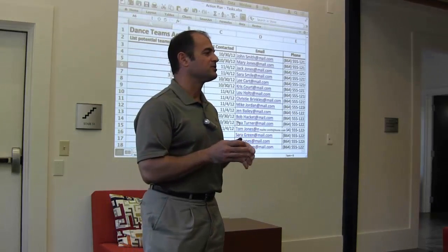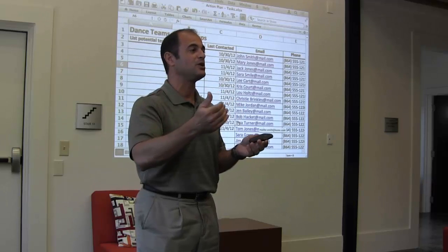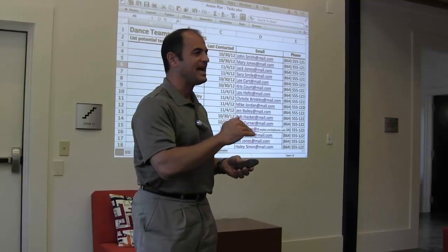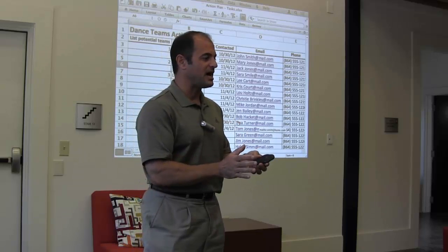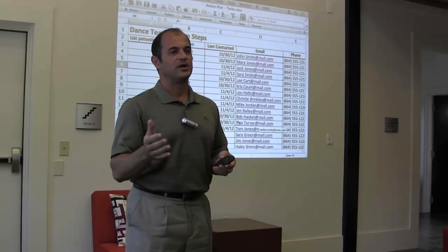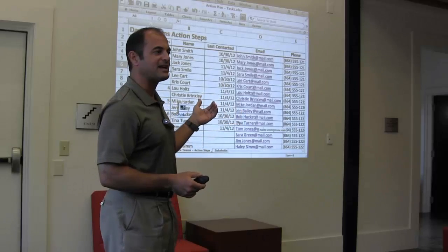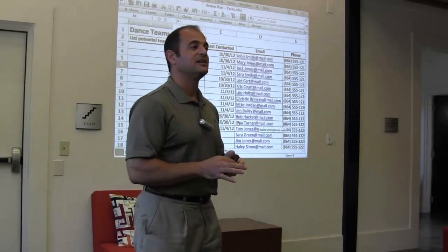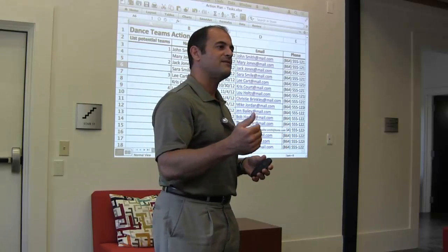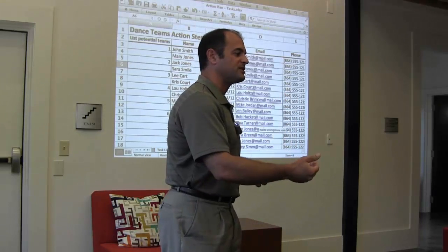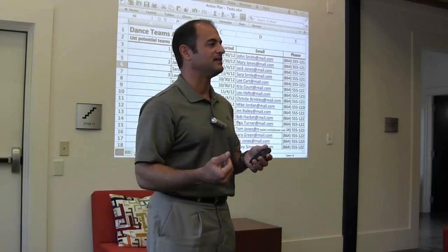But the big thing you need to make sure of on these action steps is we don't get lulled to sleep. I've only got one task to do. If that's ever happened to you, you know what I'm talking about. The problem is, in order to complete that task, there's a number of steps that have to happen. And I wait and I don't plan those action steps in between, so I end up being late. So in this case, we're looking at probably a big issue in the fact that we missed our due date. The good news is that the due date has been set by the team itself, and we're having a dance-a-thon, an event in February of next year, so October might have been ambitious, we still have time. So we still have lag time built in.